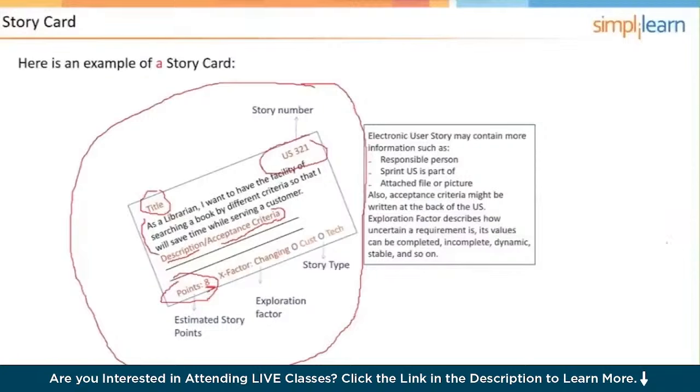There's probably, it's not listed here, but there's probably going to be a value point assignment. This is where the product owner kind of determines in a relative way the value of the stories. Just like we were doing in planning poker, the product owner might say, well, this story is twice as valuable as this other one, comparing them together. And these value points are what's used to prioritize the user stories. That's supposed to be a V, as in value points.